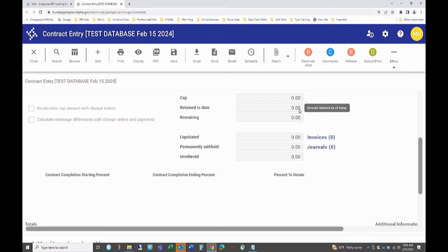A couple of things that does is it really stops people from, some clients will purchase order for 10 million and they would do a credit to the retainage control on the PO, manually tracking all that. This would be systematic. Nobody would have to enter the amount of the PO or the payment and enter the credit to the retainage. It would systematically process it.